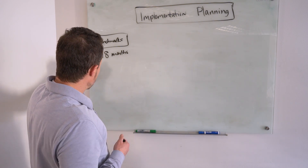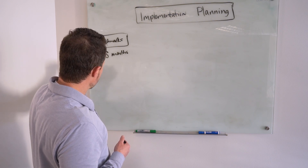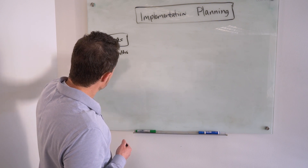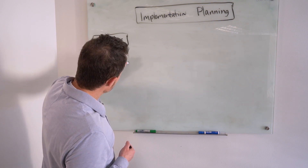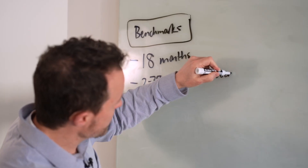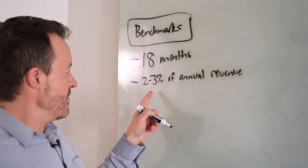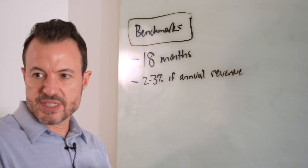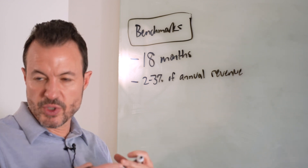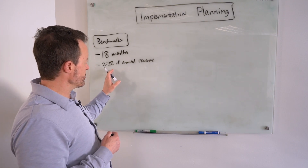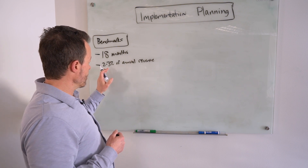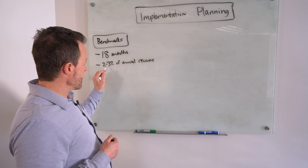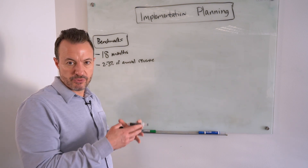There are two ways to look at average implementation cost. First, two to three percent of company revenue — or annual turnover — is typically spent on a transformation. Sometimes this can be as high as three to four percent for smaller organizations due to less economies of scale, but the average is somewhere between two and three percent of annual revenue. For example, a hundred-million-dollar company is likely to spend two to three million dollars total on its transformation.